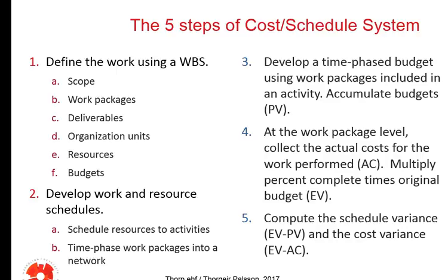So this is something we have all done already. What we are now adding to it is the final thing, which is the cost and the time control mechanism. And to do that, we need this information here. We need planned value, actual cost, and earned value, and then we can compute the cost variance and the schedule variance.